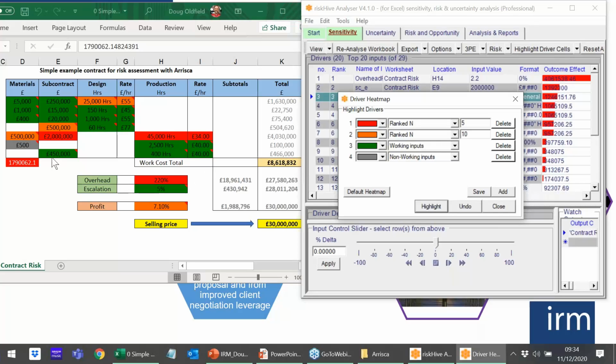And so as a risk manager, when I look at a model like this, what I then do is send it back to the person or the organisation who created the model, and ask them more about the things that are in red. You know, whereabouts do these numbers come from? Please can you explain where you got 220% from? What's the background to it? And so the things that are in red would be the first things to focus on, followed by the things that are orange, and then the green ones are less significant in the overall scheme of things.